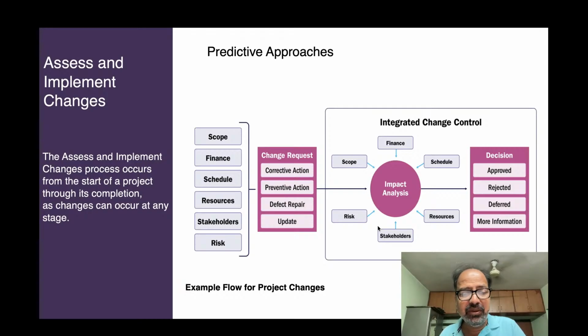If a change request impacts the project baseline, integrated change control measures should follow, and it is formally approved, deferred, or rejected by the designated person.